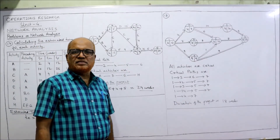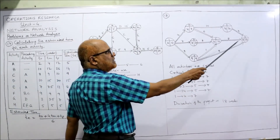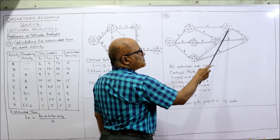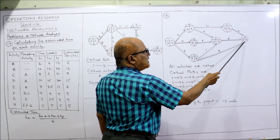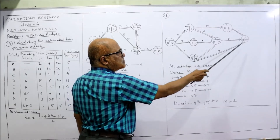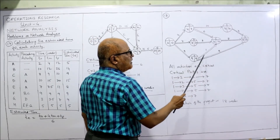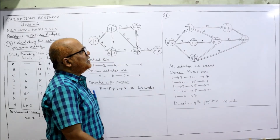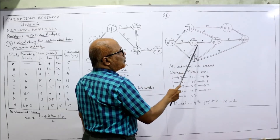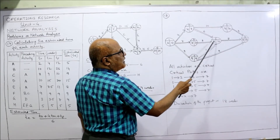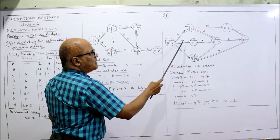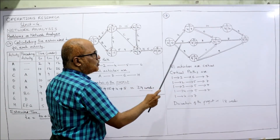Now backward pass. The EST and LFT of the last event are both 18. Working back: 18 − 8 = 10; 18 − 4 = 14; 18 − 9 = 9. Two arrows bursting at node 4: minimum of 18 − 9 = 9 and 10 − 1 = 9, so 9. Two arrows bursting at node 2: minimum of 14 − 10 = 4 and 10 − 6 = 4, so 4. One arrow busting at node 3: 10 − 3 = 7. Three arrows at node 1: 4 − 4 = 0, 7 − 7 = 0, 9 − 9 = 0.